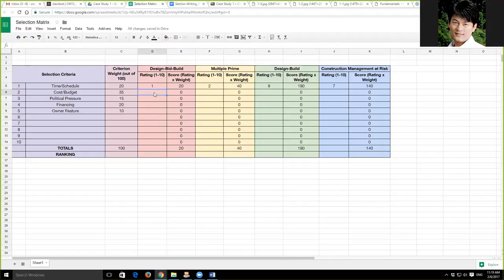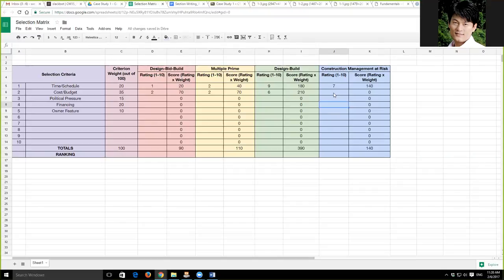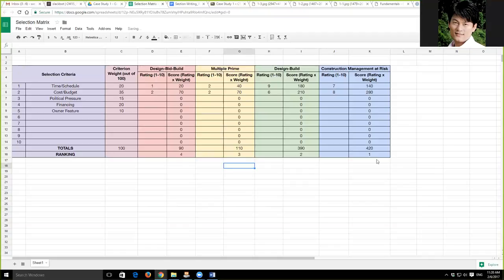Construction management at risk typically comes with a bonus — if they save money, they benefit too. Continuing through the matrix for all criteria, by finishing up you choose the option with the highest total points and say: this is my number one choice, number two choice, number three choice, and I recommend this particular one. Hopefully that explains what I'm trying to do. Look at the example from the student — that's exactly what she did: different criteria, assigned weighting factors adding up to 100, gave ratings, multiplied by weighting factors to get total scores, then picked the highest-scored delivery method.